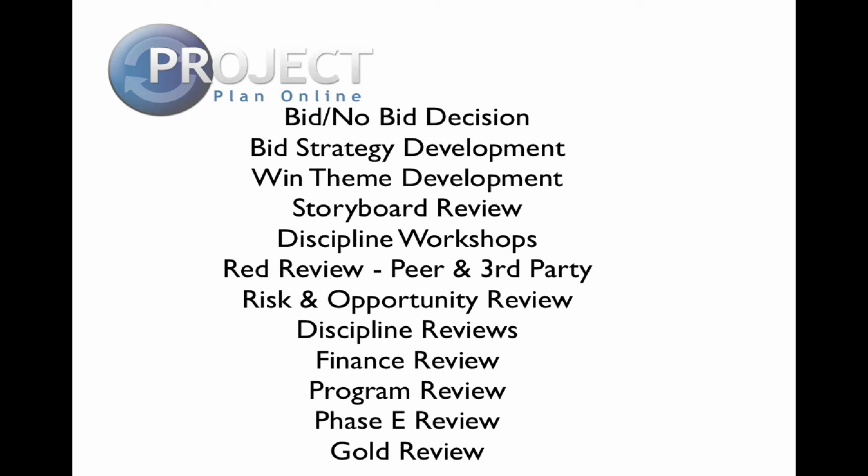Storyboard review. Before any writing takes place and once the bid strategy and win themes have been established and deliverable authors allocated, the authors were then required to storyboard how they would address the RFT requirements and integrate the bid strategy and win themes into the deliverables. Remember, this has to be done before any writing takes place. Discipline workshops. There were a series of working groups in all of the major disciplines such as commercial, finance, HR, project management, supply chain management, engineering, and these included peer reviews and third-party expert reviews.